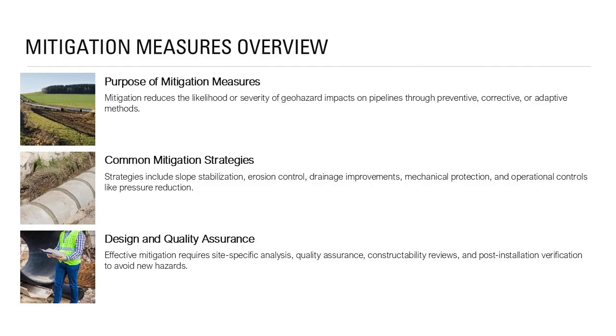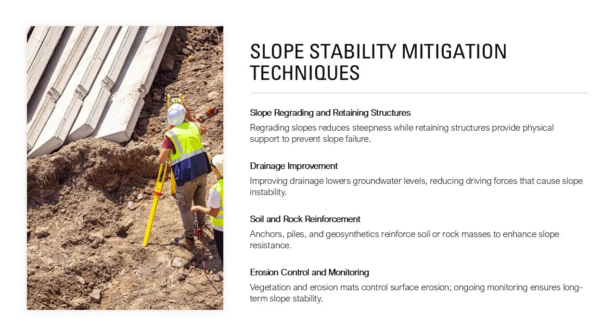Mitigation design should be informed by site-specific investigations and analysis. Poorly designed or implemented mitigation can inadvertently increase risk or create new hazards. Therefore, quality assurance, constructability review, and post-installation verification are essential. This slide provides an overview of mitigation concepts and sets the stage for more detailed discussion of specific mitigation approaches in subsequent slides.